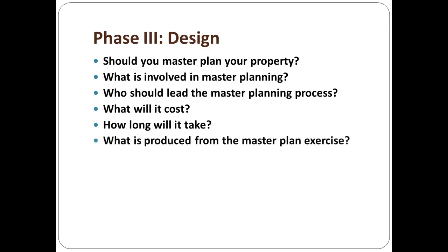What is produced from the master plan exercise? A floor plan, elevations, a site plan, perhaps an artist rendering, computer-generated 3D presentation with music and voice narration. And so you have those things coming from it. It should give you a tool to help you deal with your congregation and your fundraising, your pledges, your bank with lending you money, and your local authorities with approving the plan. But by the way, I'd go talk to your local authorities and make sure the architect does on the front end before he ever puts pen to paper, to begin to get an idea of what is the posture of your local building authorities towards your church and your expansion.